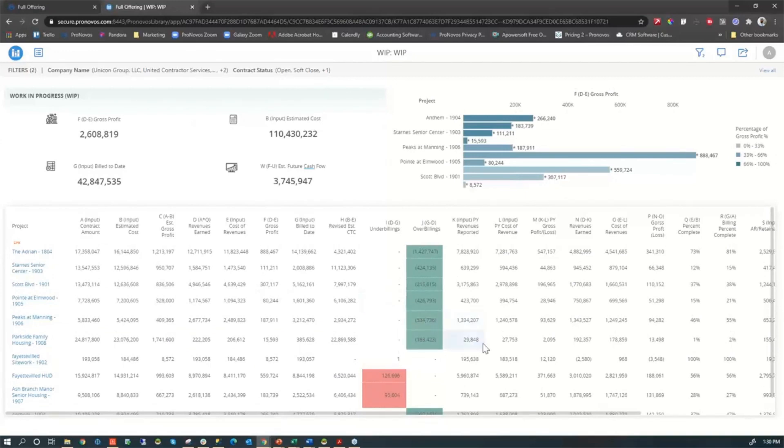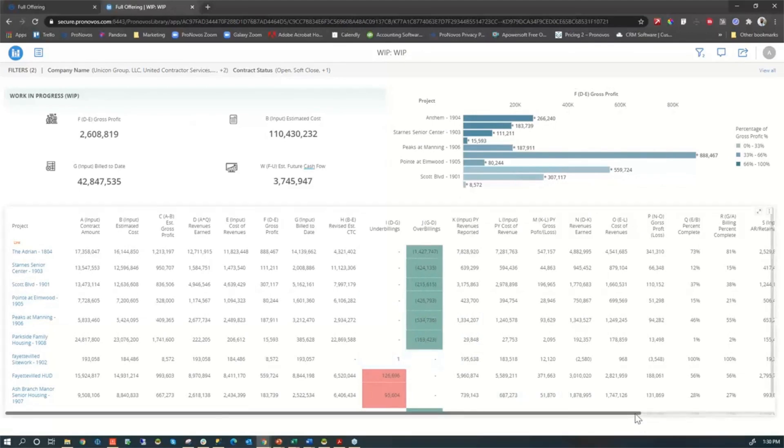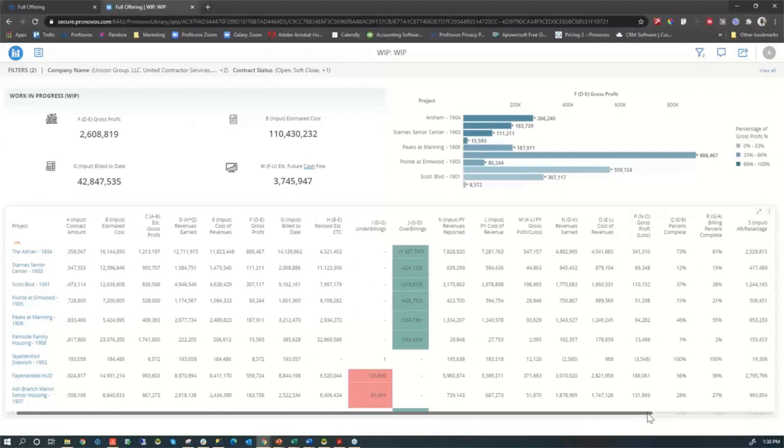We also look at things like the job borrowing for the jobs where you do have over-billings. That's probably not on a lot of people's WIPs, but it's something that's worth keeping an eye on.